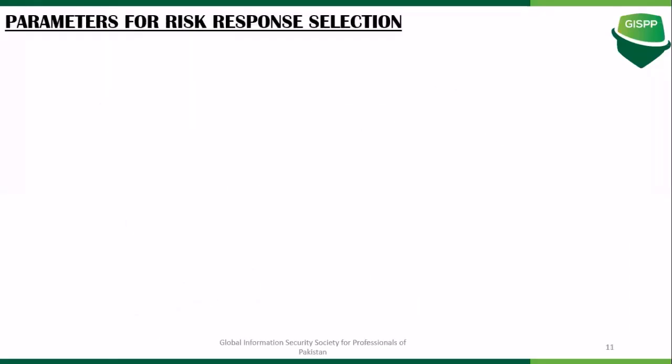And one more thing that I want to mention over here is that risk action planning has to be treated as a project with a defined start and end date, and the end date is often used to determine the critical part of the project, where you have to identify those elements of the project that can directly impact the end date. So you need to identify those areas during the entire risk action plan, or those deliverables that are going to impact the end date of your risk action plan, and focus on those areas specifically.